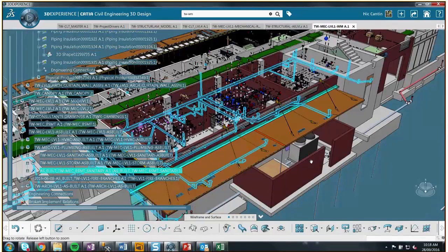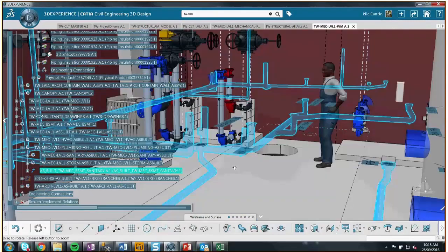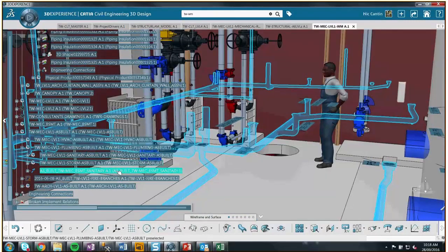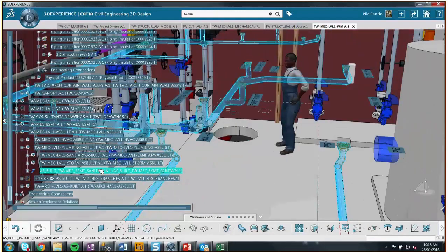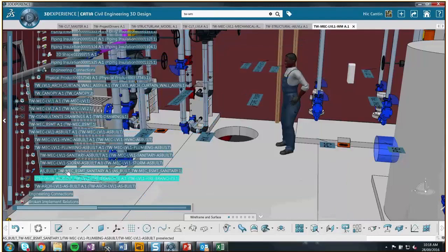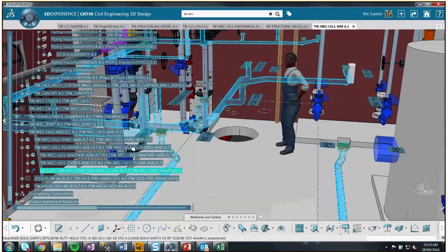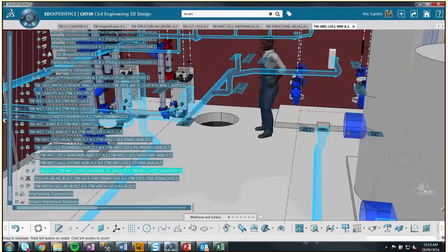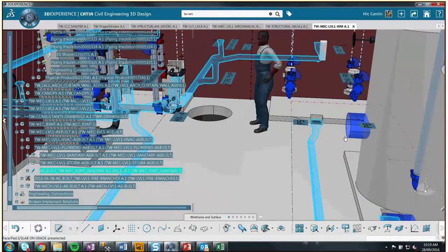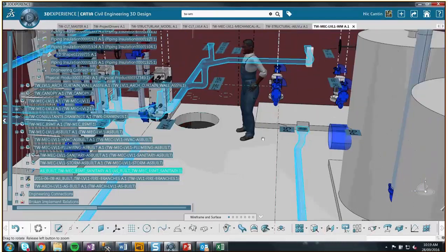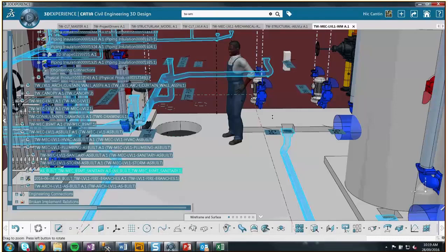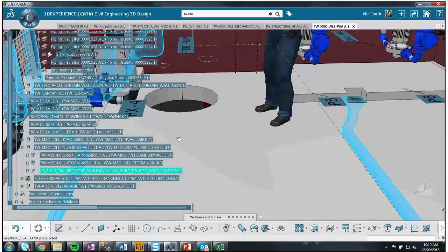And that locks the geometry, and from there we have that as a reference at any given time, and then we can change and manipulate our model, and we have that as a background as well. So managing the as-built in that sense was helpful as a visual, and since everything's parameterized, we can quickly make those modifications as we get data and info from site.